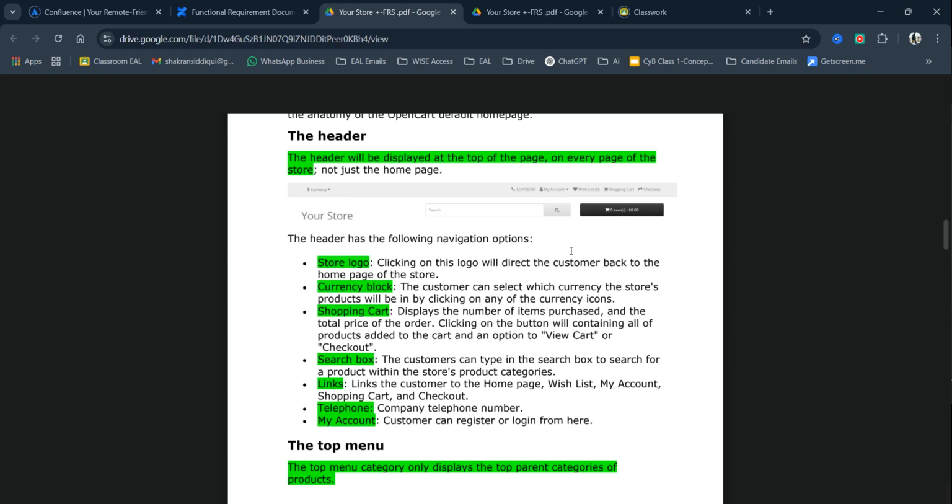If they match, it will send it to the done status. If they don't, if there are any issues or bugs or defects, we will send it to the developers to fix it again. So, in order to do all that, we don't have anything here. We just know what it does and how it will work. That's all.